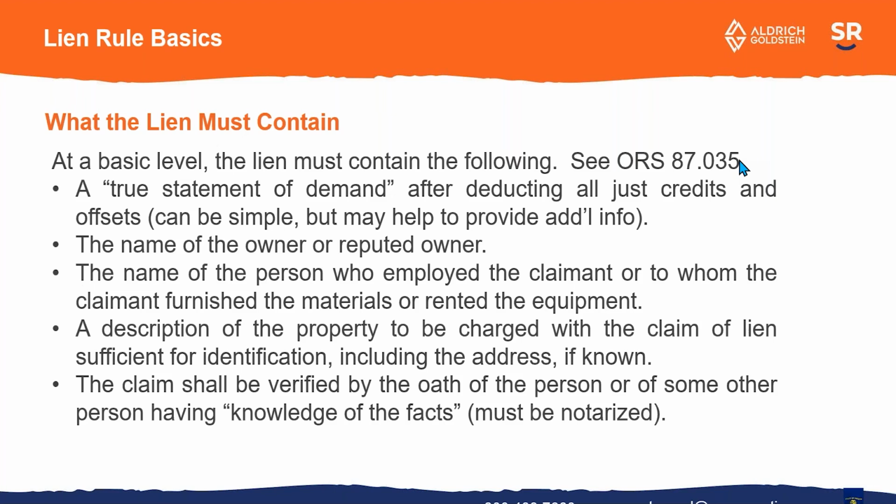Needs to include a description of the property. The address is not required, but if you know it, you should put it down. And then you can also get the legal description for the property. And the claim finally needs to be verified by oath of the person who has knowledge of the facts.